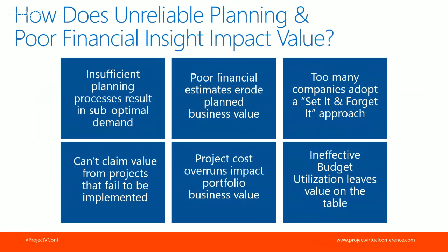Let's say the project estimates are too low in the business case across your projects. All that happens is you have projects with cost overruns, you're simply going to have to cut projects, and again, value will be lost. So poor financial estimating or cost estimating certainly hits you in the back pocket from a business value realization point of view.